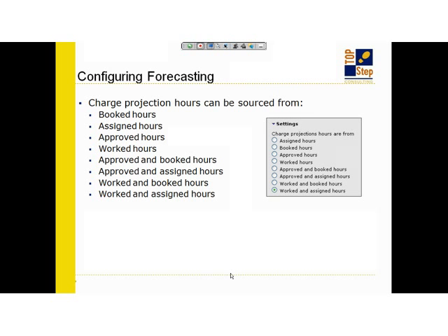Booked versus assigned hours is a very common debate on which will work better for your company. It does reflect how you're doing resource management, who's in control of resources. I find companies that use assigned hours are more project management centric, so the project managers have more responsibility to make sure they're using their team effectively.